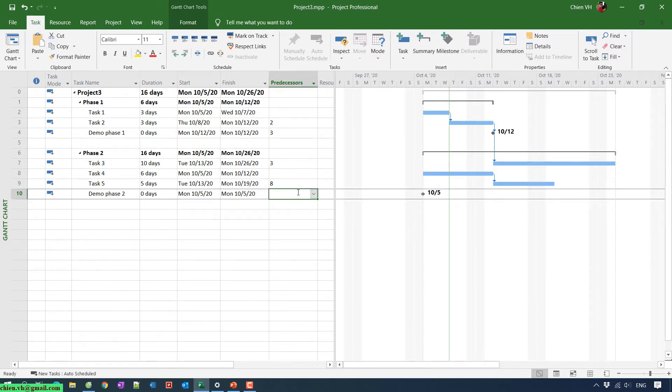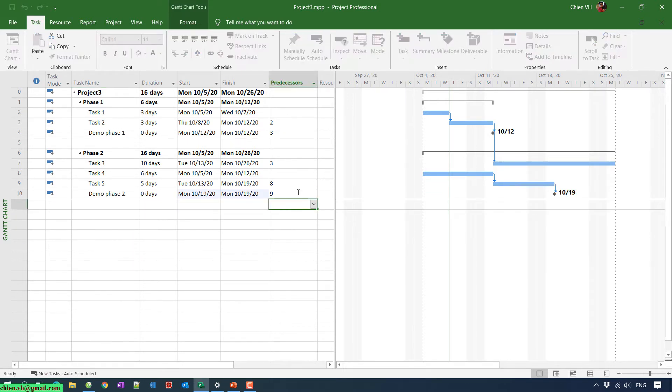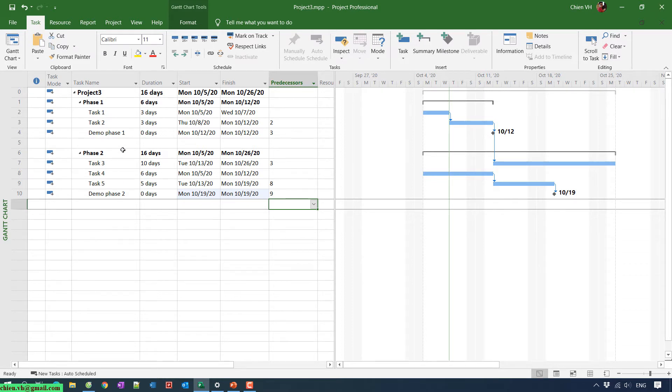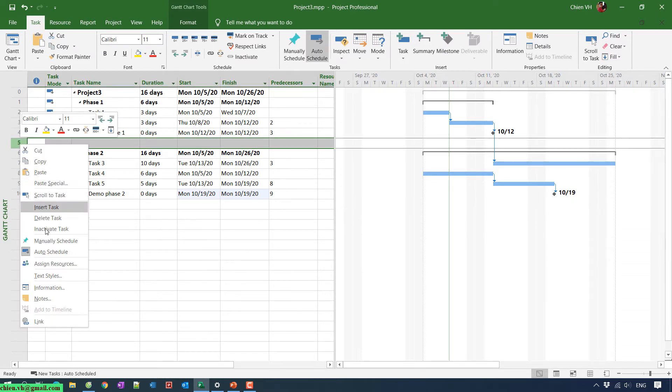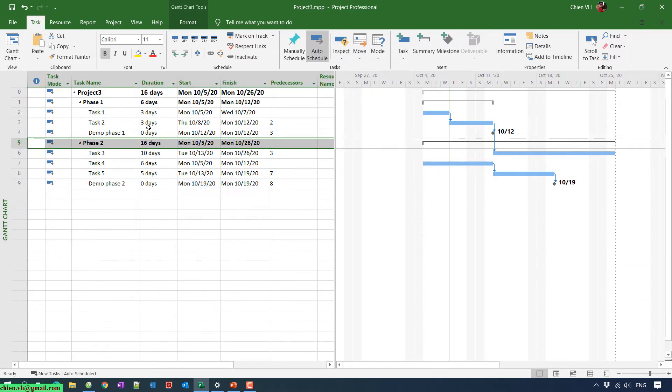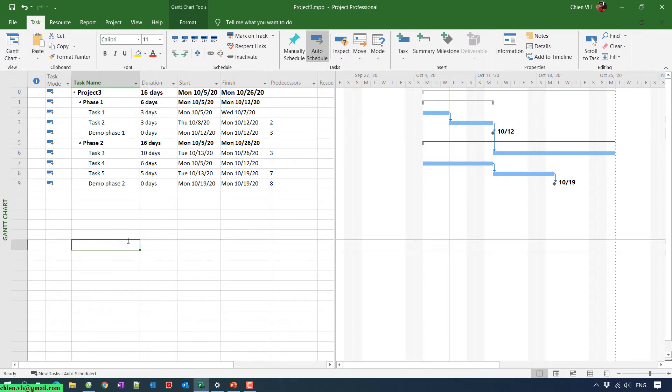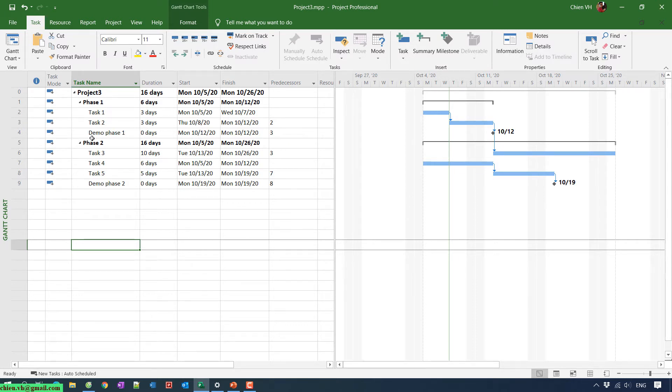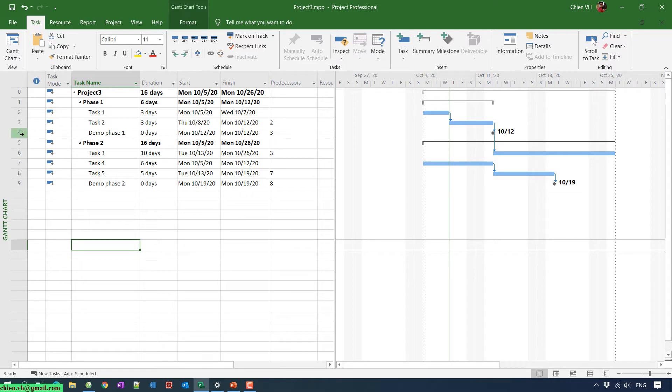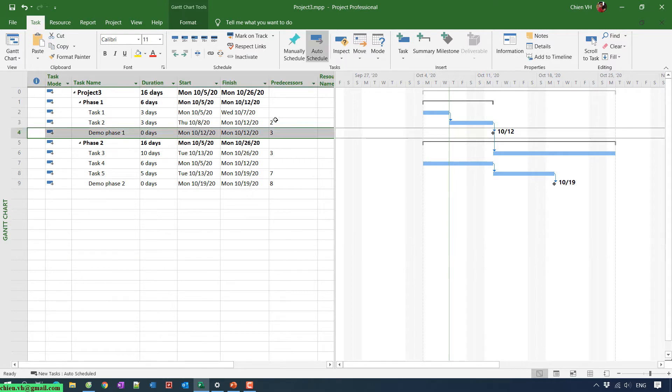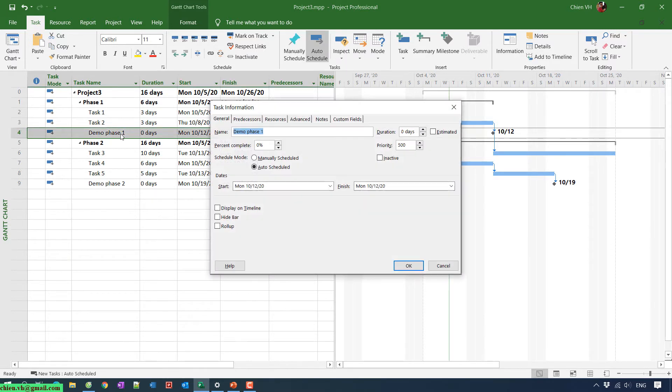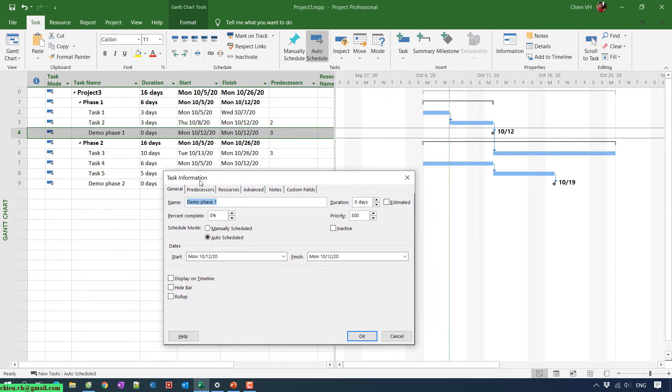So you see here for my milestone, the duration will be zero days. For example, you see we have the demo day for Phase 1 will be finished on 12 October, so I will double-click on this one and you will see the task information pop-up.